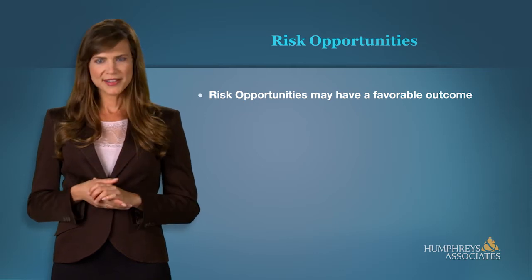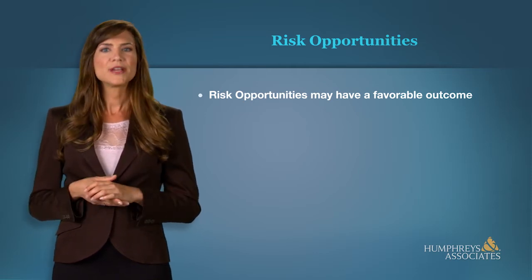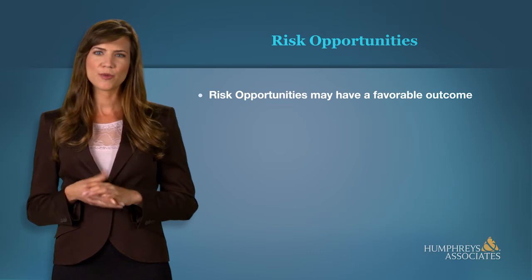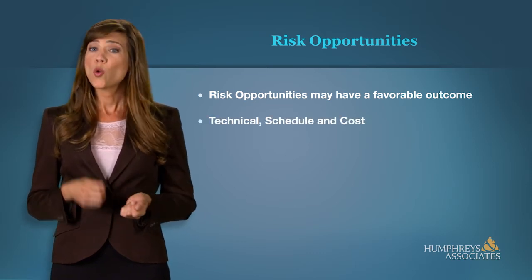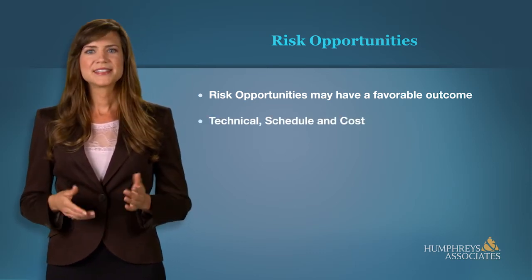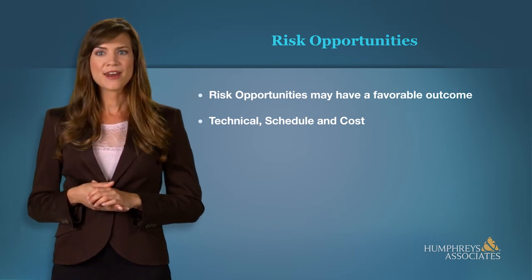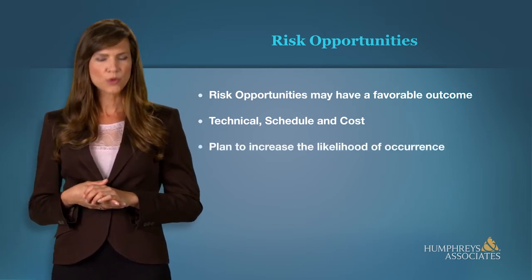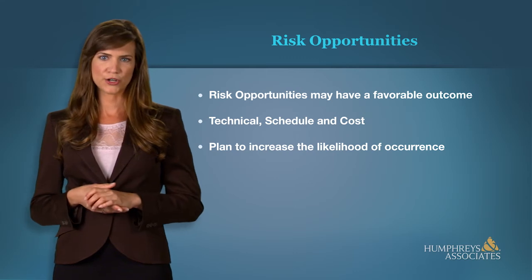There are also positive risks. These are called risk opportunities and may have a favorable impact to technical, schedule, or cost outcomes. Instead of a risk mitigation plan, an opportunity will have a plan to exploit that opportunity to increase the likelihood of occurrence.